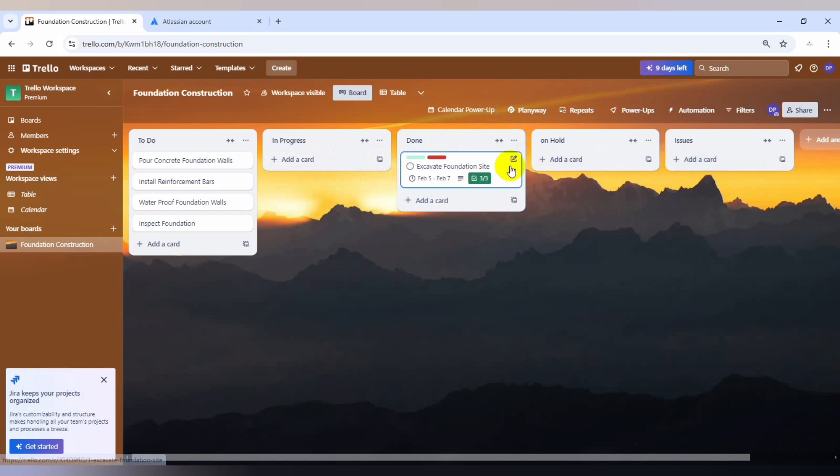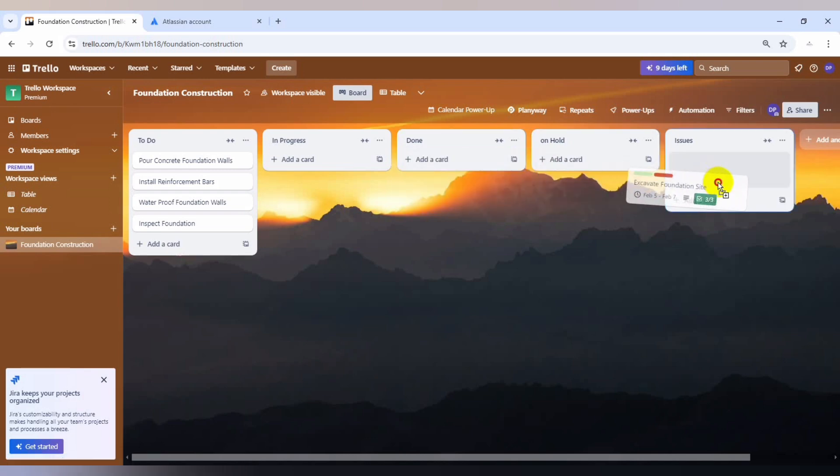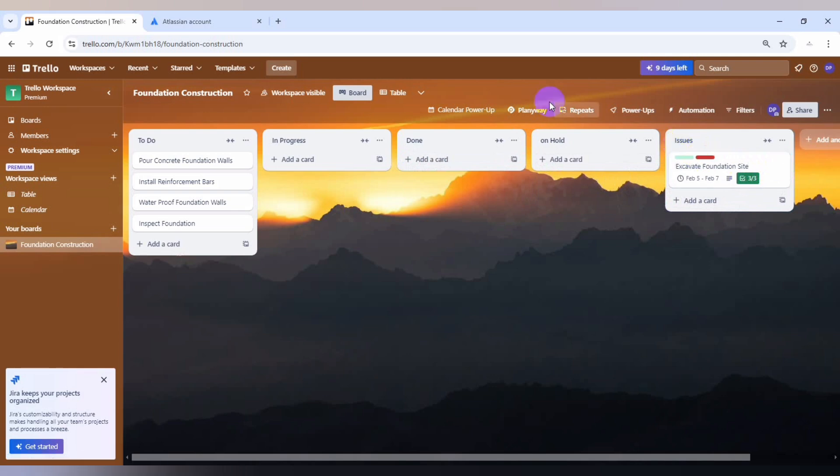If there are any issues also, let's say if you encounter unexpected large rocks or utility lines that need to be addressed before continuing with the excavation, you can now identify by using some of these cards. So do well to look at Trello and see how it's going to be useful for you.